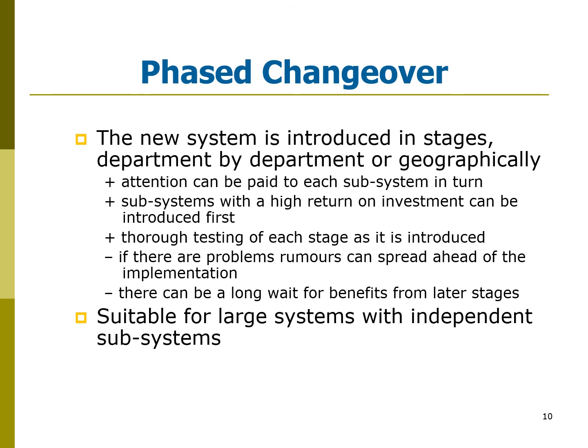Okay, the subsystem or module with high return on investment, the most critical module for that organization, can be tried first. Right? And the bad thing about this approach is that if one of the modules is not running well, it will spread rumors across the organization.